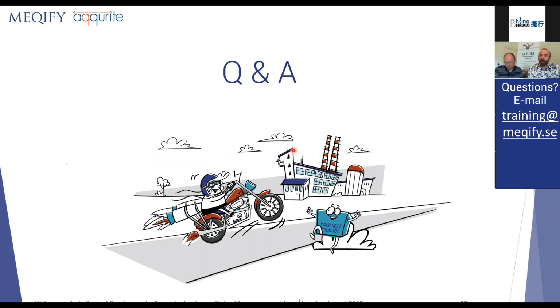So that means that the electronic development team could design, build, and test the PCB in a 2 week sprint. We went so fast with the hardware that the software teams, or software members, told us, we don't need any more updated electronics. You are running faster than us. Then we are at the correct pace.